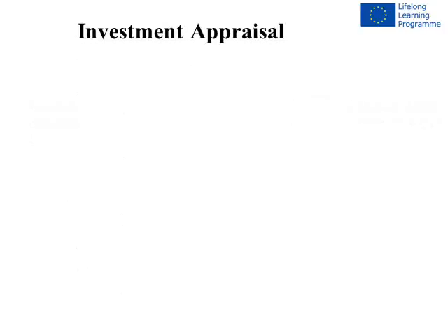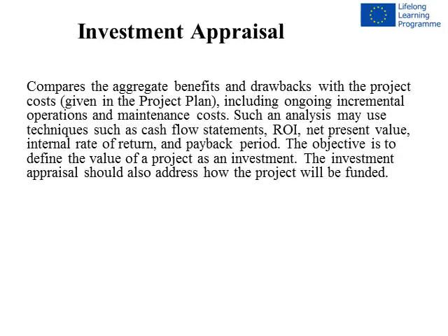Investment appraisal compares the aggregate benefits and drawbacks with the project costs given in the project plan, including ongoing incremental operations and maintenance costs. Such an analysis may use techniques such as cash flow statements, ROI, net present value, internal rate of return, and payback period. The objective is to define the value of a project as an investment. The investment appraisal should also address how the project will be funded.